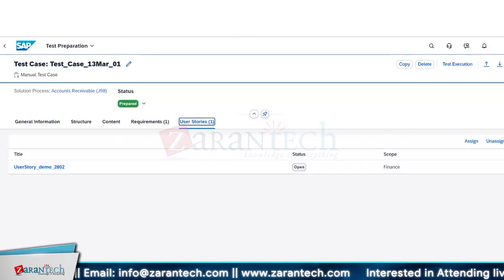Correct? For that we have to do some testing for that particular stage also. Then we have to see whether it is working or not. Then consolidately we'll create one particular test script with all the screenshot capture. Then we'll send it for the business approval, to get the approval to move the changes, if all the things are okay.